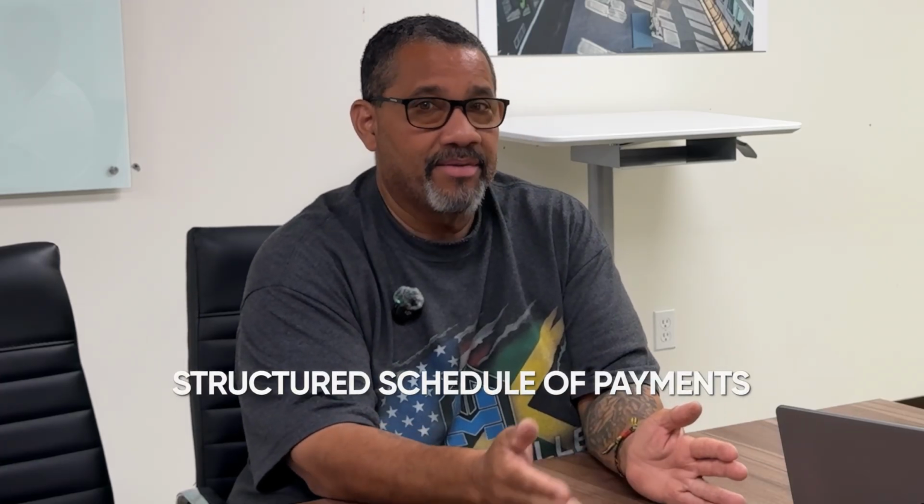We stick with the traditional AIA pay app. So it's the same thing like if you're building a high-rise stick built or you're building a house stick built, you have a contract and there's a pay app and there's a structured schedule of payments that are due from the very first dollar you issue to the last payment made to us. And that's called progressive billing and progressive payments. And then on top of that, you verify stuff completed. So when we issue an invoice for payment to a client, we always request and insist they come in, they verify what we've completed, they verify they're satisfied with what we've completed, and now they know we can move to the next step, and whatever they're paying for, they know they've gotten what they've paid for.